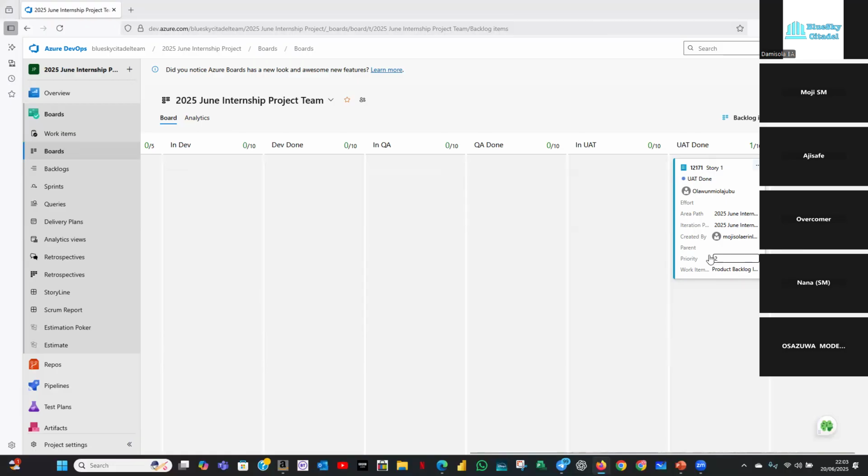So if a task has been created on this and is not closed, it will show the task, and it will be showing maybe 0 over, depending on the number of tasks on it. And I'm coming to stand-up and I'm saying, okay, so this story is done, because your BA is not checking that. Your BA is not checking, oh, have they closed their task on it? Your BA is just coming to carry out their user acceptance test and all that.